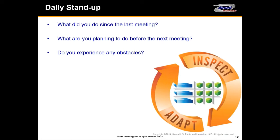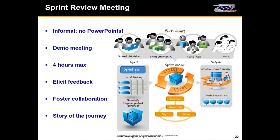In this day and age, people are dispersed all over the place, so you'll use collaborating tools to run your daily stand-up or daily scrum meeting. You need to be straight to the point because of the time limitation. This is not about debating or arguing — it's about what did we do yesterday, what are we going to do today, do we have any obstacles or anything to be concerned about, and you involve your Scrum master to help along the way.